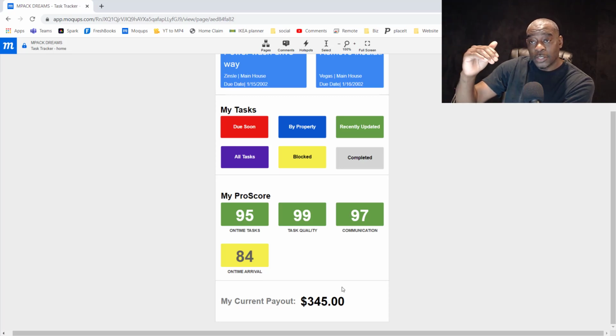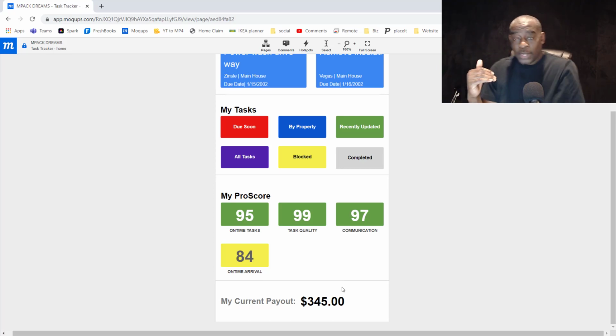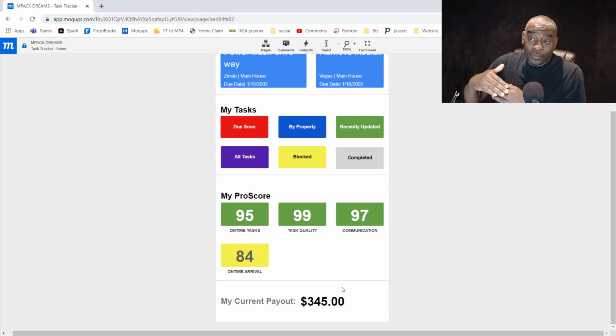And understand that the statuses speak to that. There's a status where the person who's assigned this task says this is complete, then there's a verification process that says, yep, it is complete, so let's close it. You only get paid once it's closed, right? So if you've got a bunch of completes queuing up and it's Thursday afternoon, you're probably pressuring your task owner, saying, hey, these have been done. Can you go ahead and close these out? Because this has a direct reflection on my bottom line, on how much I expect my check to be on a Friday. So this is going to be the payout.